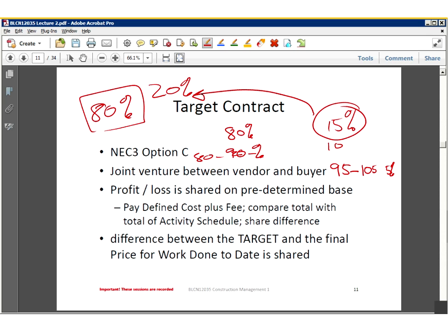It's basically an incentive, a joint venture between these two parties to make sure that they do keep together. The same with if it goes over. Let's say the contractor comes in at 120%, which means that he spent 20% more than what they anticipated. Based on these contribution scales, we'll do a calculation and the contractor will be, yep, there we go, it's a share, pain and gain. Yep, perfect, Ryan, that's exactly what it is.